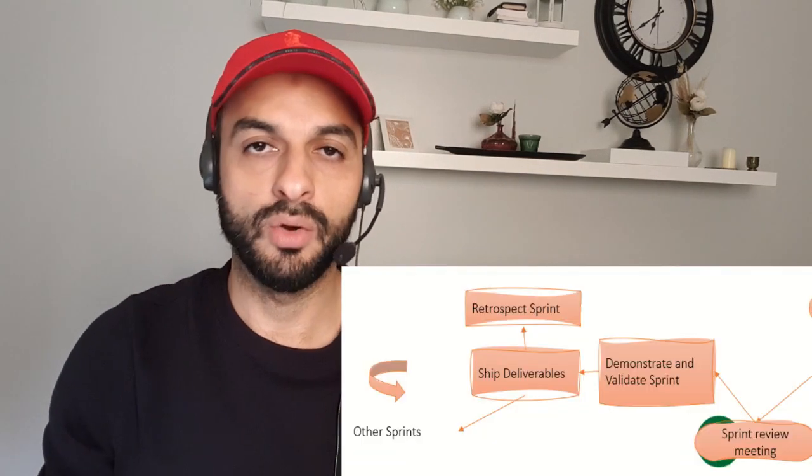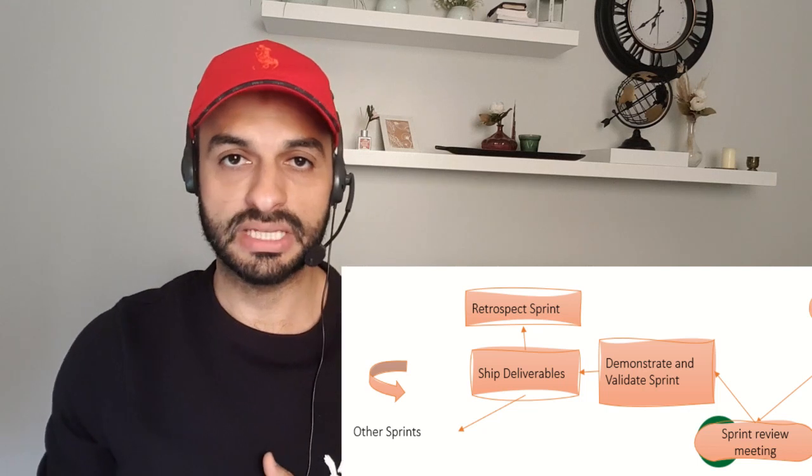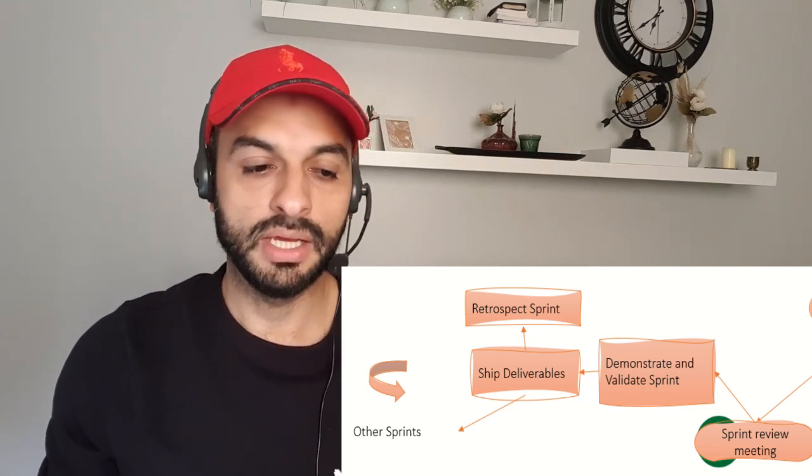After you deliver or submit the sprint to the customer, you hold something called a sprint retrospective. Retrospective here means lessons learned. What lessons have we learned from this sprint, to avoid repeating bad ones, or to repeat good ones in the new sprint? So in the retrospective you say, what are the problems that we made? Why did the customer reject the output? Or what are the good ideas that we had so that we can repeat them? This is the sprint retrospective.